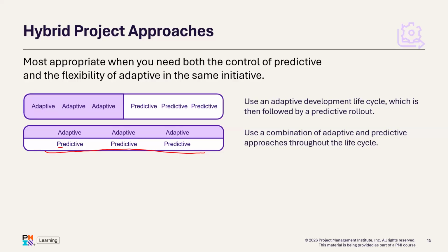So you are practicing the adaptive concept on a less risky project in parallel with the predictive approach to gain mastery. As you gain more mastery or more confidence in using the approach, you'll be reducing the predictive methodologies and increasing the adaptive methodology until you take over the whole place using the adaptive concept. So the second approach, which is adaptive and predictive approach used simultaneously, is for transition. It's a transition strategy.